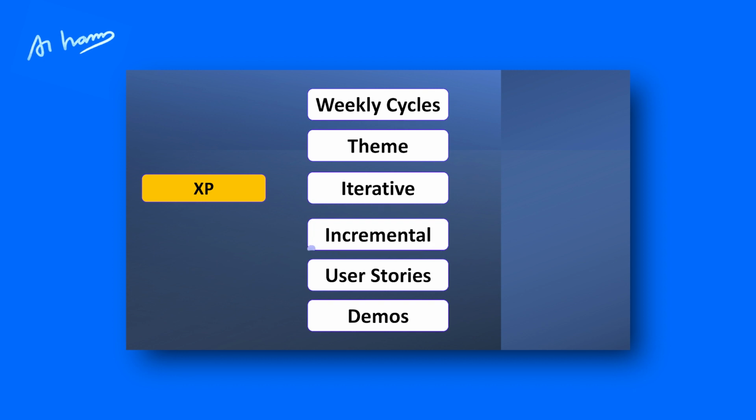What is the difference between iterative and incremental? Let me help you understand that. This could be a question on some competitive examinations also, right? People get confused. What is iterative? What is incremental? Iterative is, let's say you have got a particular use case. The use case cannot be developed in 5 days. It takes you 20 days, 4 weeks, 2 sprints or 4 iterations of 1 week sprint. So it's like 1, 2, 3, 4. After 4 weeks of working, you get some feedback from the customer.